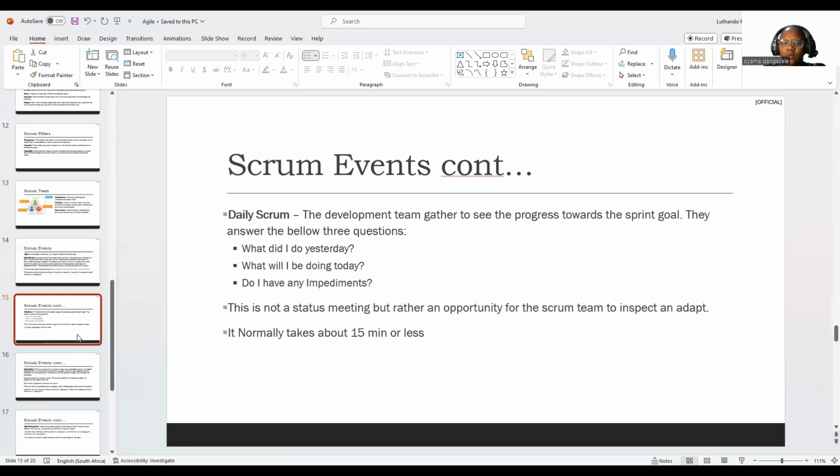Okay. And what we normally answer is, what is it that I did yesterday? What will I be doing today? And do I have any impediments that I would like assistance on? And it normally takes right about 15 minutes or less.